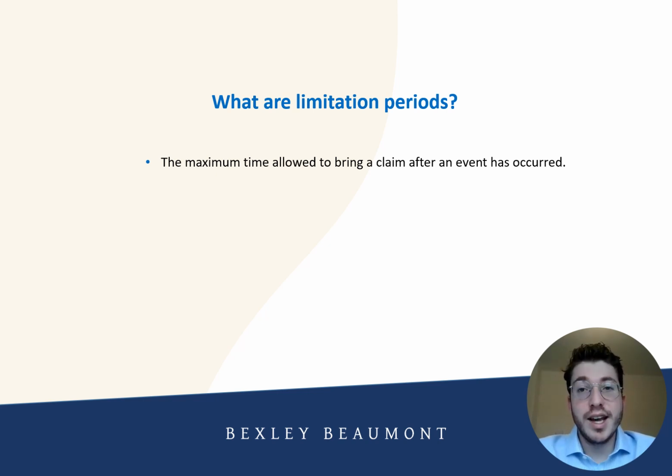In legal terms, a limitation period is the maximum time allowed to bring a claim after an event has occurred. If you miss this window, you may lose the right to make that claim regardless of its merits. The defendant will have a full defense to say that the claim is time barred. In construction, limitation periods apply to various types of claims, including breaches of contract, defects, and unpaid work. So being aware of these time limits is very important to protecting your position.